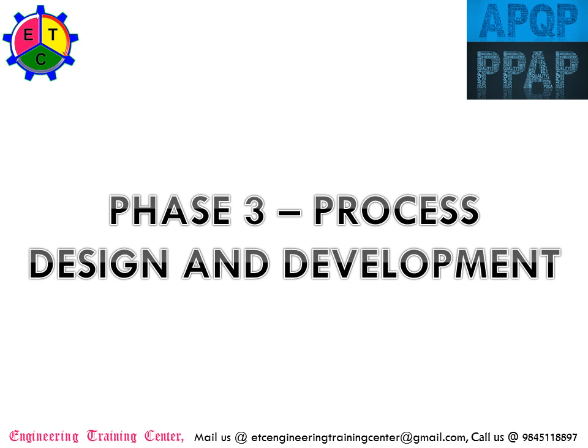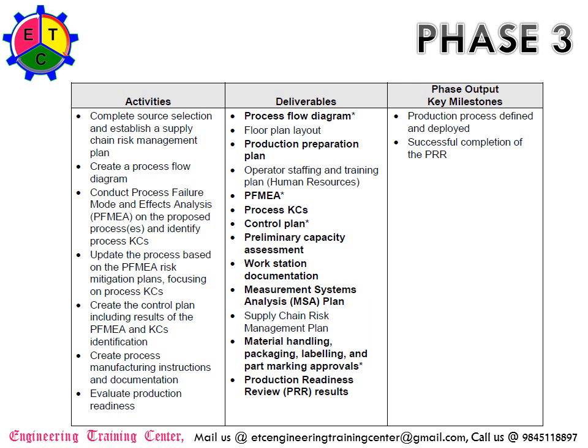Phase 3 is known as Process Design and Development. The activities in Phase 3 include: complete the source selection, establish the supply chain risk management plan, create the process flow diagram, conduct the Process Failure Mode and Effect Analysis (PFMEA) on the proposed processes, identify the process key characteristics, update the process based on the PFMEA risk mitigation plans focusing on process key characteristics, and create the control plan including results of the PFMEA and key characteristics. Also create the process manufacturing instructions documentation and evaluate the production readiness.